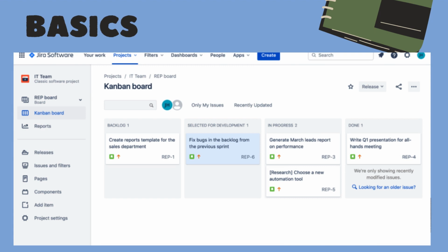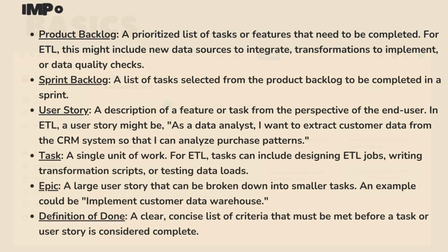It contains all the information about in progress, done, and approved tasks of every individual who is part of a board. Each story contains a story point and also adds how many hours it might take for every story. So this is how the Kanban board looks. Let's understand important terms under Jira.